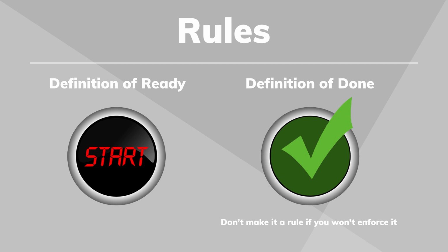Okay, that seems obvious, right? But over and over and over in projects, there will be this, oh, well, I'll fix it next sprint. Let's just go ahead and claim that it's done now. No, do not give in on that. They can't claim that it's done and therefore collect the points for the story unless it truly is done per the definition of done, which we all agreed to up front. So really important to make sure that these are stuck to. They really need to be enforced. And again, in the micro-credential, we talk more about what can go into a definition of done. But that's our goal here.